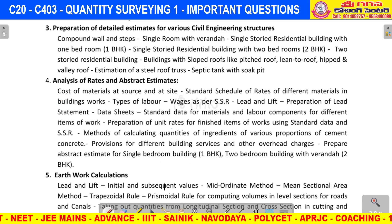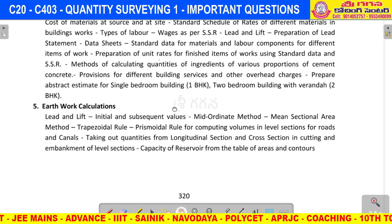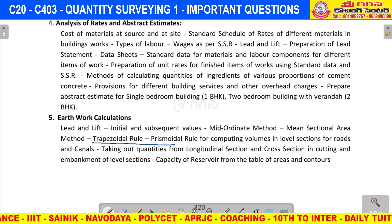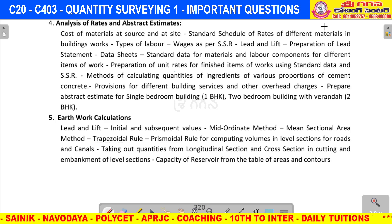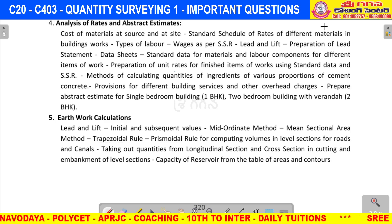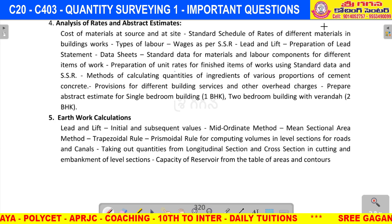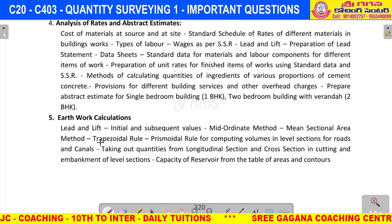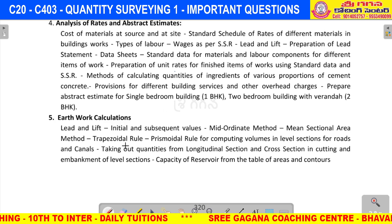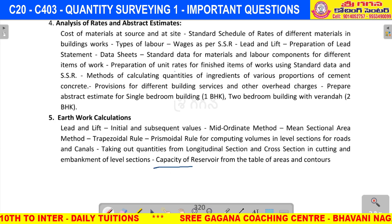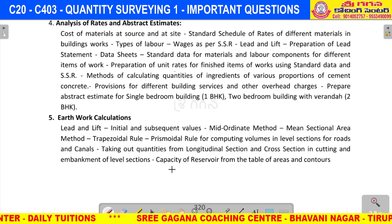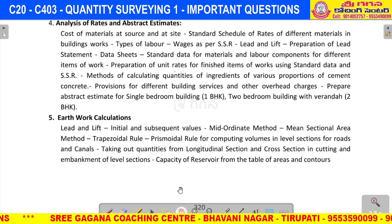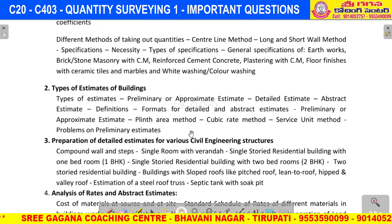The fifth unit is Earthwork Calculation, which is very very easy. There are two rules: the Prismoidal Rule and the Trapezoidal Rule. We calculate the depth of cutting and the depth of filling using these two formulas. Next, we also find out the capacity of a reservoir using these methods.